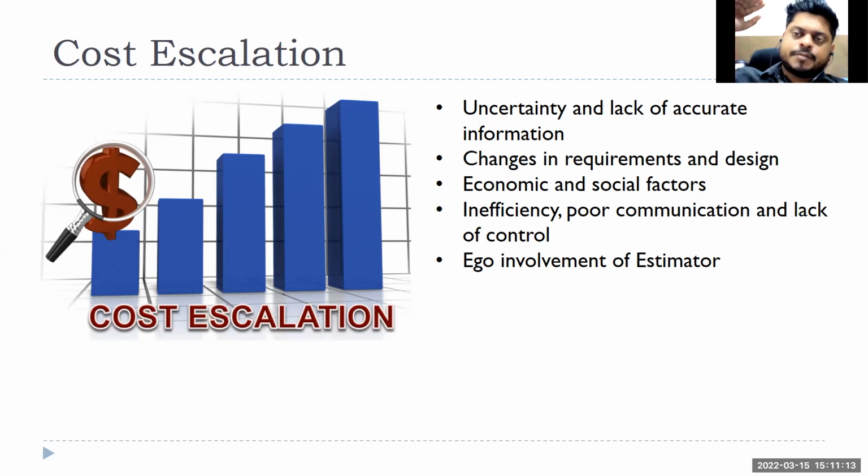Remember what we discussed in the beginning, right? Any changes which happen in the beginning of the project planning phase will cost you less. Just think about a house construction. In the beginning, if somebody says, rather than 3 bedrooms, put 4 bedrooms, the house construction has not started. So obviously, changing the plan, going to the municipality office, taking another approval might cost you a little bit. But imagine the scenario when you have already constructed, piling work has started, the initial work has started. Then somebody says, no, we should put another 2 or 3 pillars, right? Then the problem happens. It will cost you more.